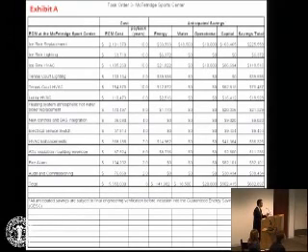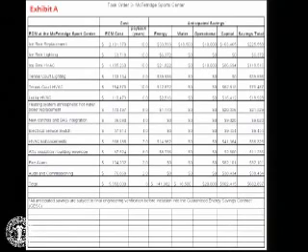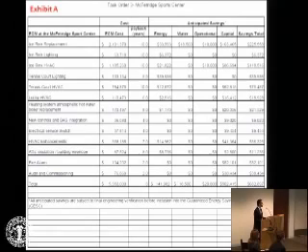This is a list of the scope items in this particular task order. So again, the ice rink replacement, HVAC, tennis court lighting, lobby HVAC, heating systems, new BAS control systems, electrical service, attic insulation, fire alarm, conduit commissioning. These things result in an annual energy savings of over $140,000. That's a pretty hefty annual energy savings, so it's a great site for that. We also are realizing over $18,000 in water savings per year. And then coupled with other operational and capital avoidance costs, it's got a less than 10-year payback.